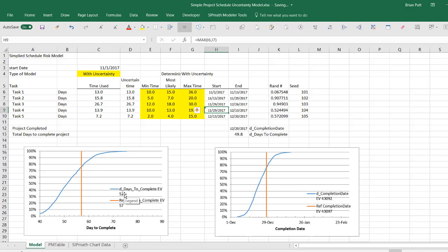Look how we mitigated the issue here. We're actually below what we thought we could do originally by changing the schedule a little bit. Or you might say it's the maximum of these things, but there has to be a 5-day delay in here for whatever reason. And so now I'm back to 57 days. This shows the flexibility of the small little model that easily could be populated by the subject matter experts, and now I have a much better assessment of the uncertainty.